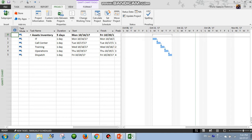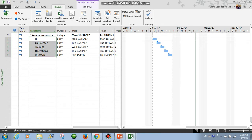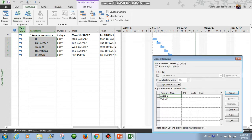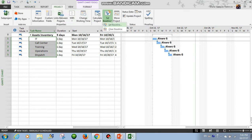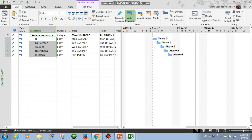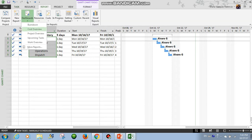First, let's see what happens when we don't have a variance, when everything goes as we planned. We have a project for asset inventory and the plan is that all this work will be done by only one person, that will be Albert. As we finish the planning, we need to set the baseline. If we don't set the baseline, we cannot track the variance. In the other files that I will open, the baseline is already set. Also, we need to tell the project that we completed the work — here in task schedule, 100%. So let's see how the report looks when we don't have a variance.